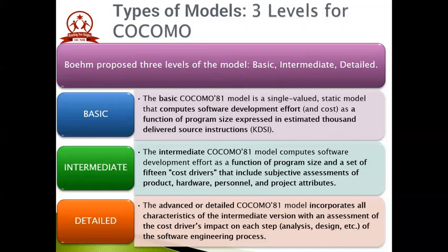Thus, the advanced or the detailed model incorporates all the characteristics of the intermediate version with an assessment of cost drivers' impact on each step, that is analysis, design, coding, testing, and implementation phase of the software engineering process.